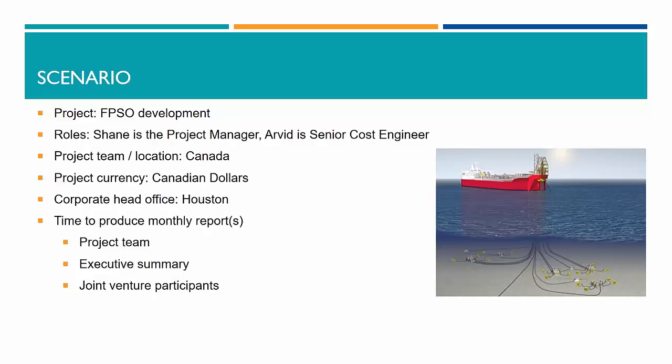We have the financials in terms of actuals and commitments coming from SAP, Oracle, whatever ERP system you might be using into Pims. We've got the earned value calculations being managed in Pims, and in fact during the basic engineering phases we can bring that directly in from our Pims document control product straight into Pims Cost.